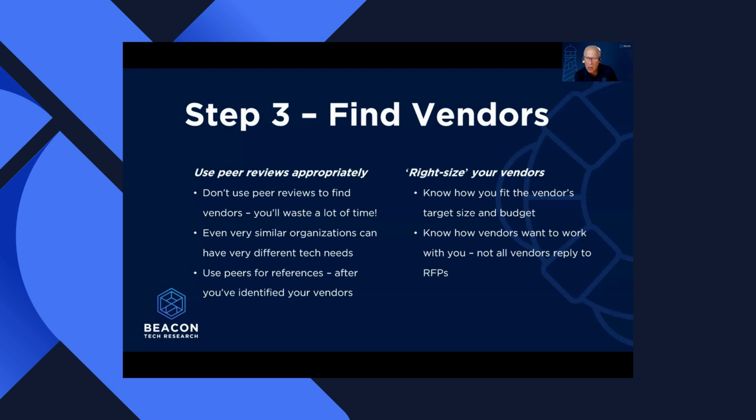Know how the vendors want to work with you. The vendors at the lower end of the spectrum, the less expensive end, don't go through the trouble of putting together a huge RFP because they're not going to respond to that. Their cost of sale is just too small. You are counter shopping when you're shopping for an out-of-the-box solution that's going to cost you under $50,000 to purchase.